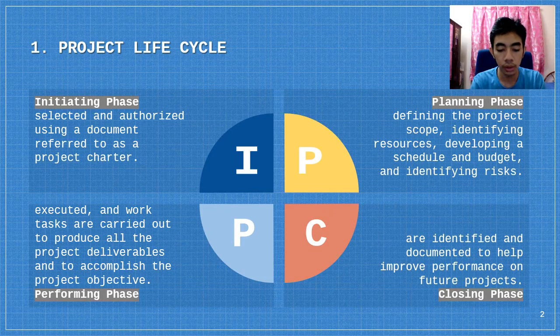In the third phase of the project life cycle, the project manager leads the project team to complete the project. The pace of the project increases as more and various resources are involved in the project. It is necessary to monitor and control the project progress by comparing accomplishment to the baseline plan. Corrective actions are taken if a project is off track. Changes are managed and controlled through documentation, approval, and communication with agreement between the sponsor and contractor.